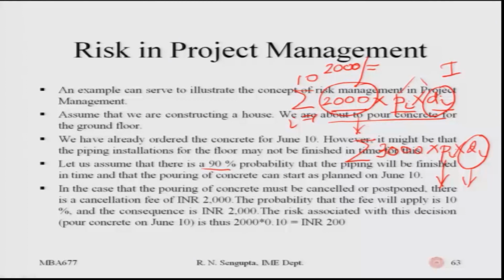Hence, the total cost of the risk, based on which you will find the overall risk for the project, would depend on the probability, on the number of days, and also on the rate of loss a project will face for each number of days, which in the first instance for 5 days is 2000, and in the second instance is 3000. Next, to extend the discussion, consider the cost of 2000